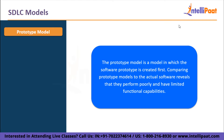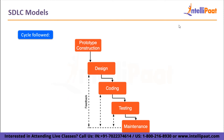Now we will talk about the prototype model. In this model, a software prototype is created first. Prototypes perform with limited functional capabilities compared to the actual software and are built with dummy functionalities — useful for figuring out what the customer actually wants. Software prototypes are created before the final product to obtain useful user feedback. After taking into account user feedback, the prototype is examined by the client again. This continues until the consumer accepts the model. After gathering requirements, a rapid design is made, a prototype is developed and delivered to the customer for review, and the prototype is modified in response to client comments.